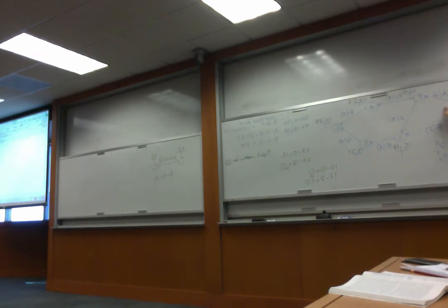Second condition, we need equal numbers at the ending point. A ends at 2. Do we have equal numbers at 2? Yes, 10, 10. So the first two conditions are true. Last condition, the difference: 10 minus 0 should be equal to the length of the activity. 10 minus 0 is equal to 10. So all three conditions are true.